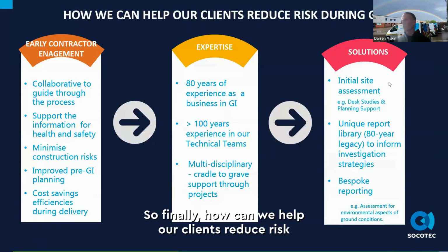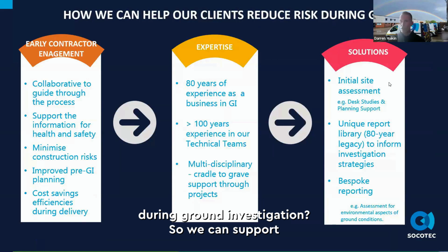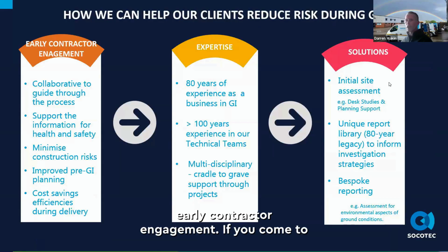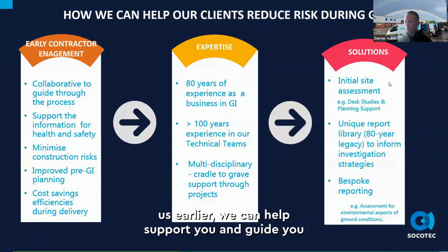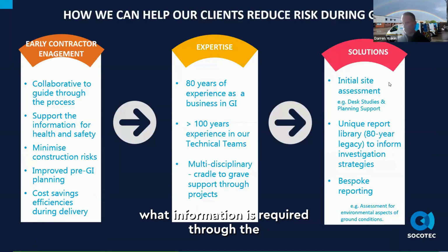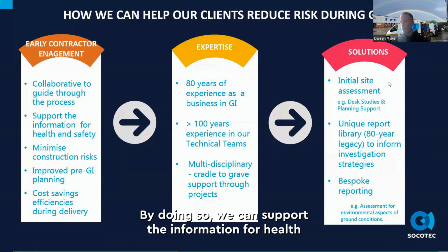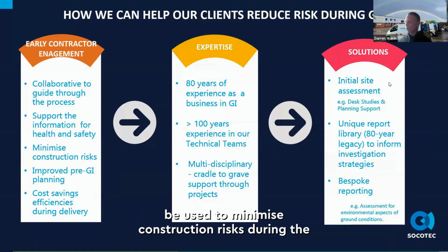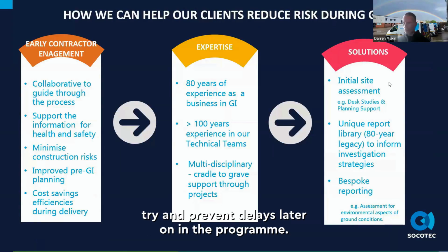So finally, how can we help our clients reduce risk during ground investigation? We can support our clients through a collaborative process, early contractor engagement. If you come to us earlier, we can help support you and guide you through what information is required through the pre-construction information stage. By doing so, we can support the information for health and safety, and it can be used to minimise construction risks during the ground investigation, to try and prevent delays later on in the programme.